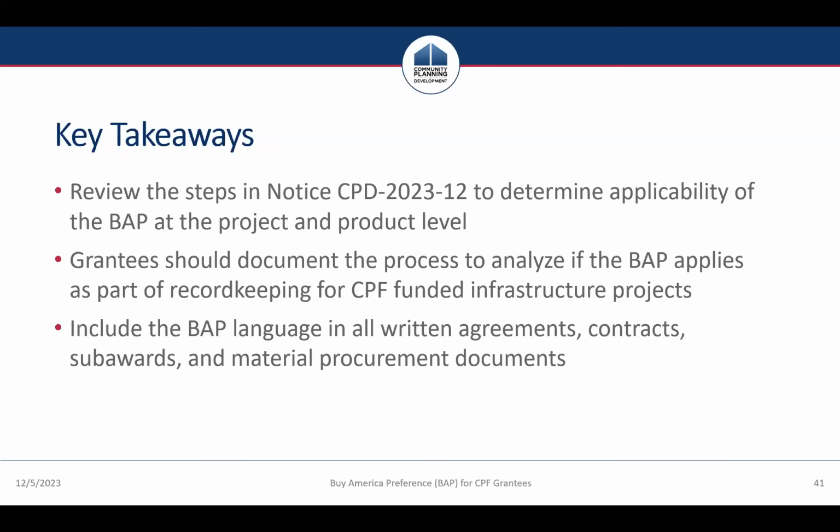your CPF infrastructure projects. Also, we recommend that you be sure to include the BAP language in all written agreements, contracts, subawards, and material procurement documents. Go ahead and get that language in those agreements and those documents now. This will set you up for success when you ask contractors and material suppliers for their BAP product certifications in the future.